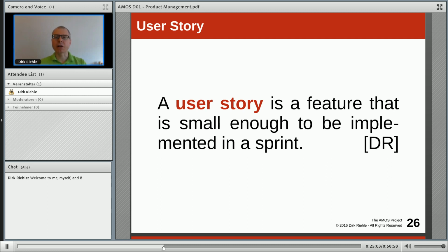And then developers handle such a large feature in such a way that, in a follow-on step to sprint planning, they actually sit down and break down a large feature into tasks, technical tasks, not business value, but tasks from the perspective of how a team of software developers can implement a large feature.